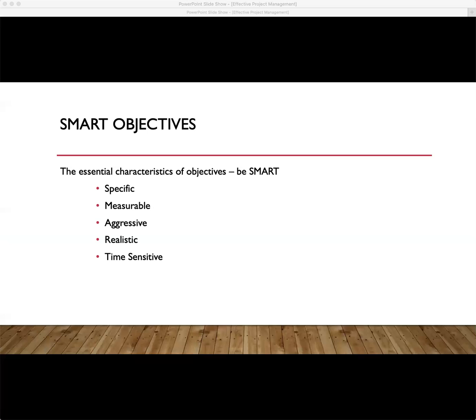Realistic. Targets should be appropriate to the investment available, the overall market scenario, and the capabilities of staff. Unrealistic goals will demotivate staff. I knew a small nonprofit that each year budgeted a fundraising target of $1 million, despite never having raised more than $350,000 and having a trend in the opposite direction.